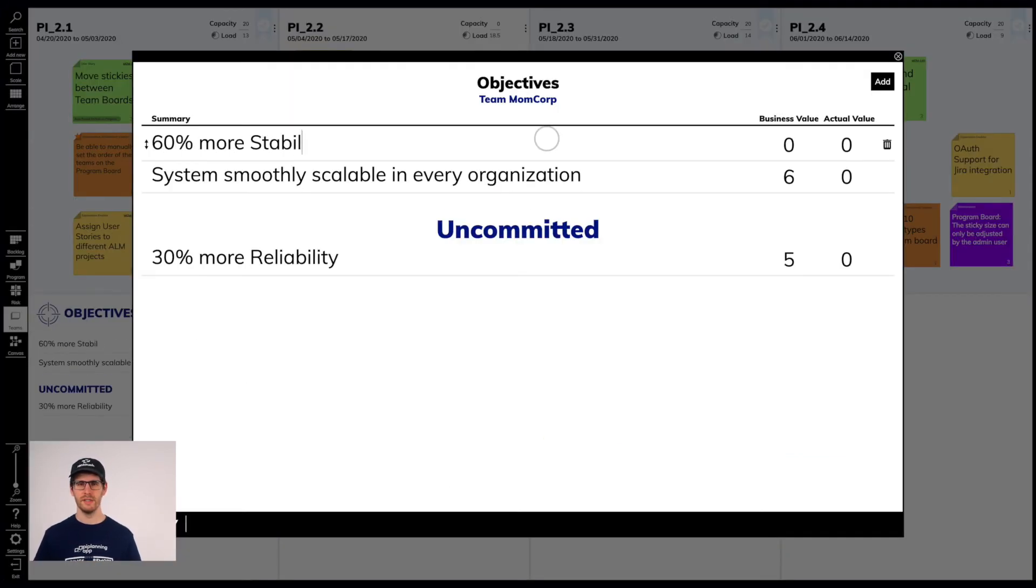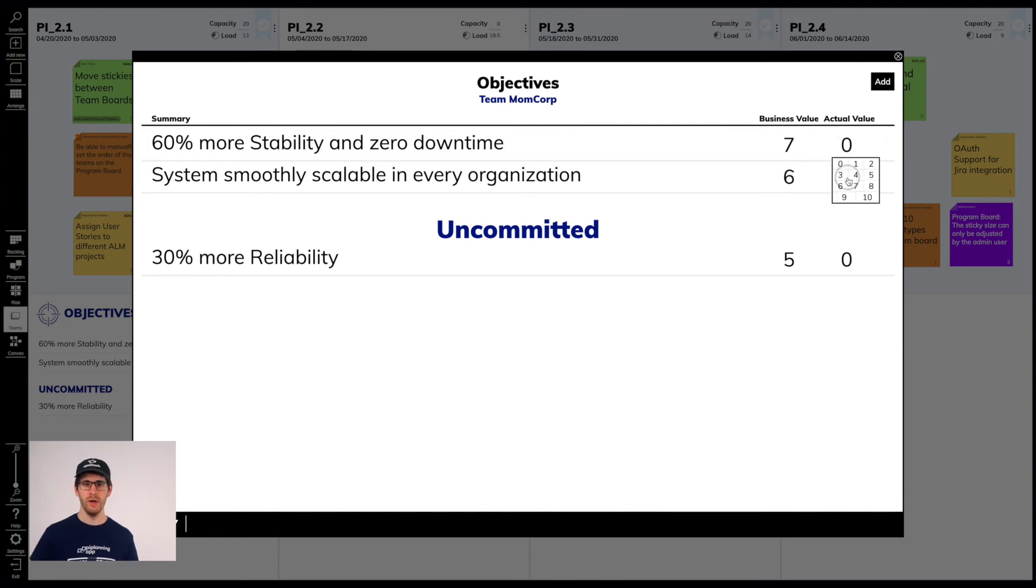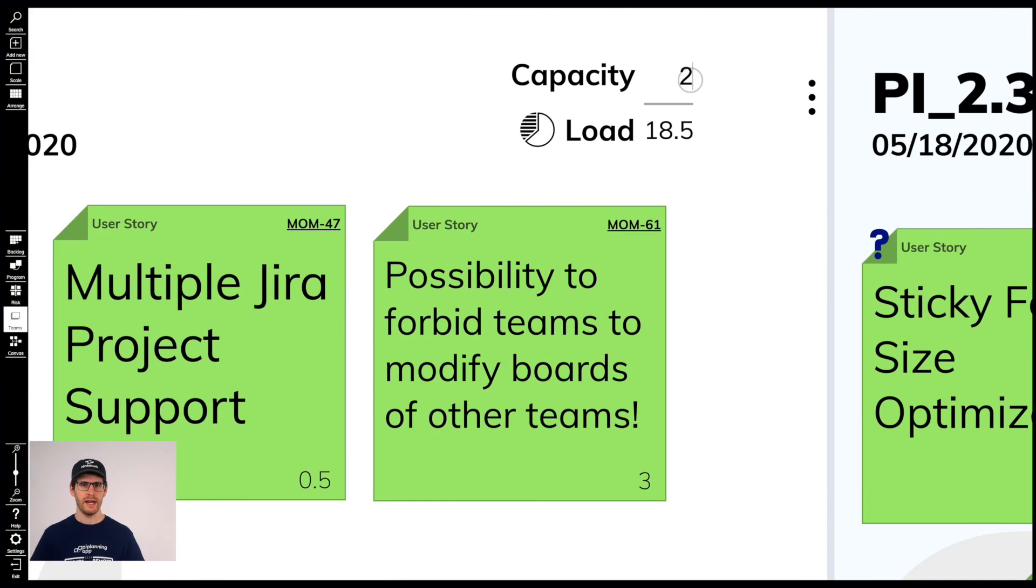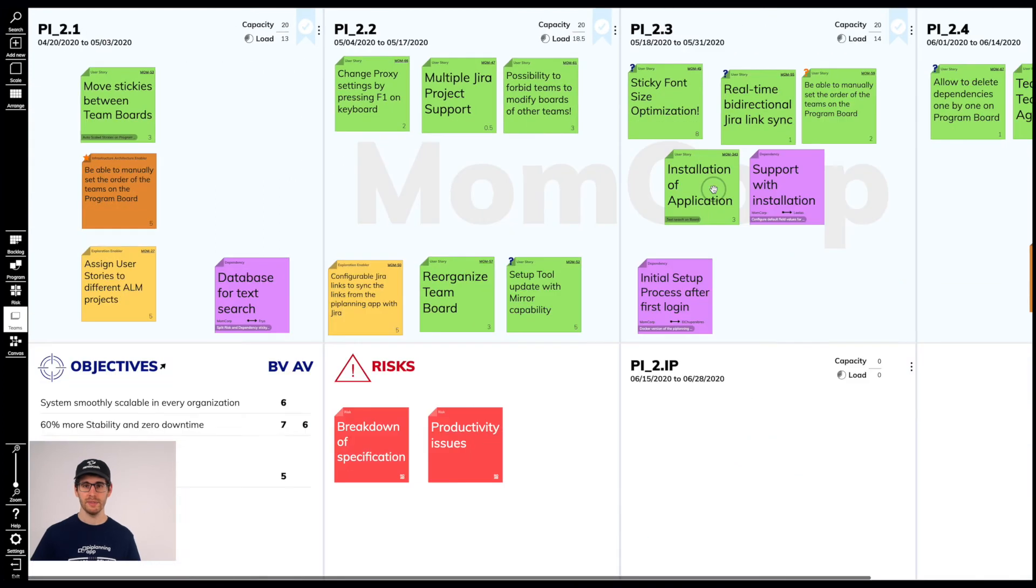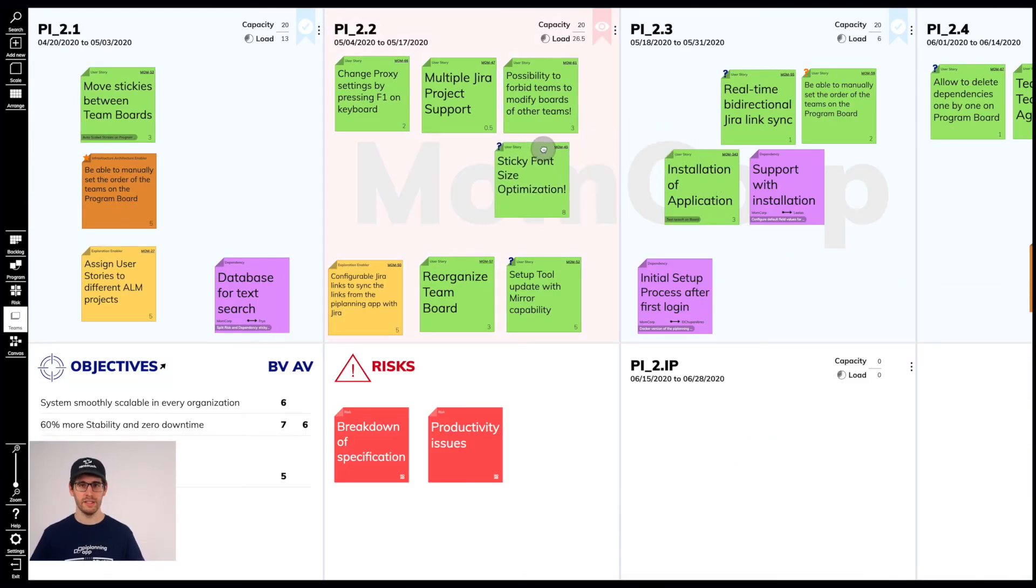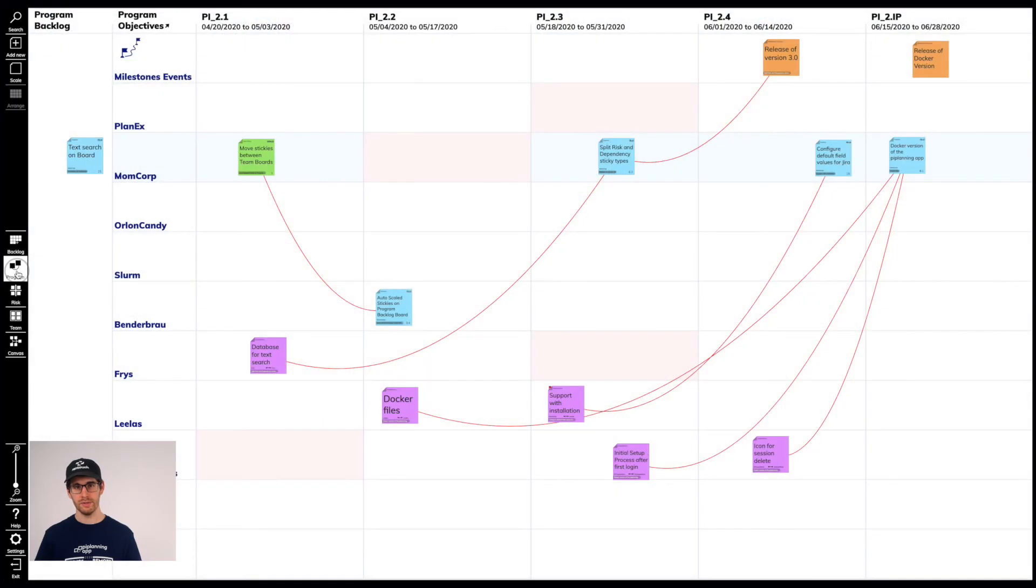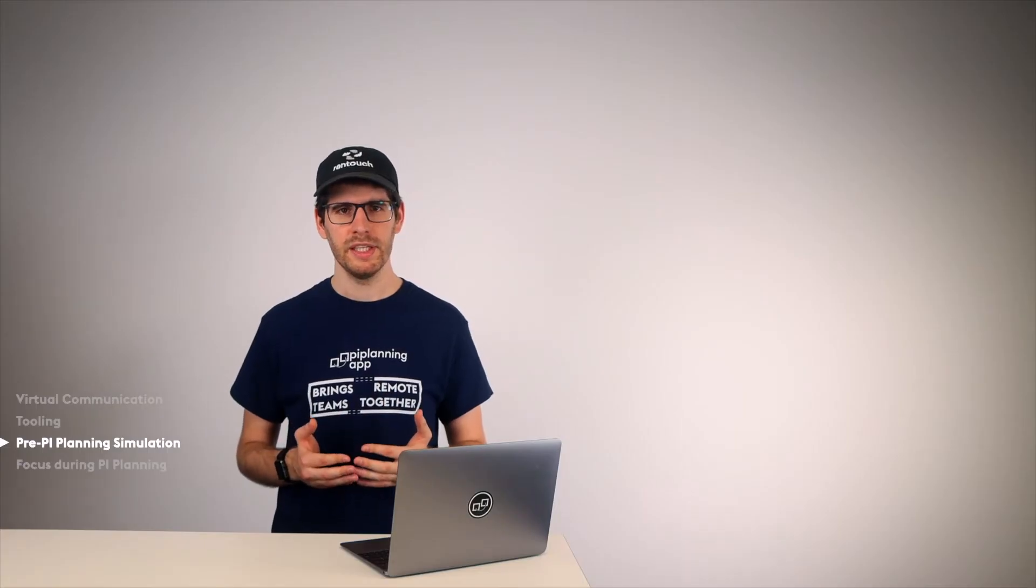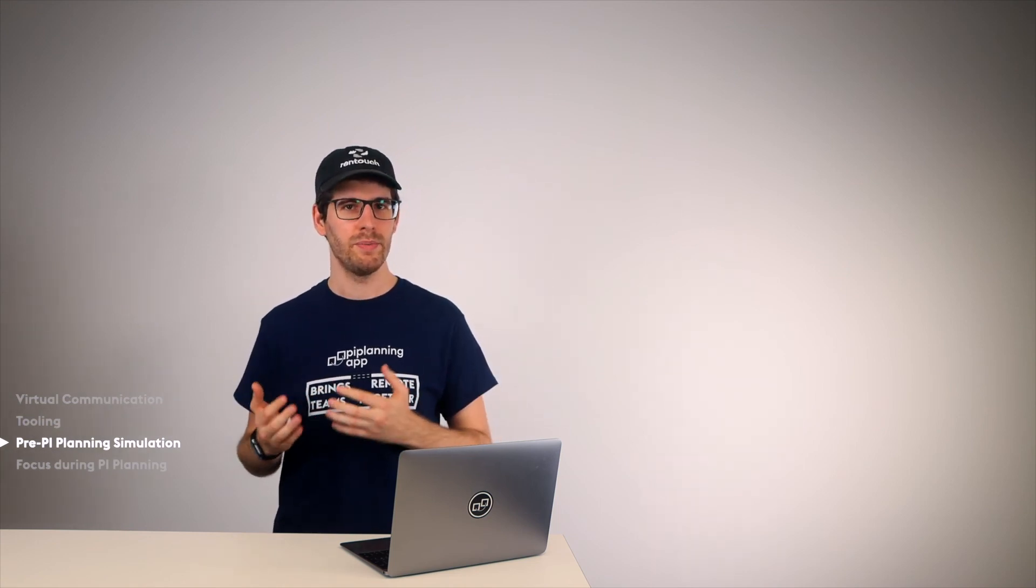Also, how to define objectives. Point out again when to assign business value and who and when to assign actual business value. How to specify the capacity for an iteration. Briefly outline what happens when the capacity is exceeded and where this becomes visible. Namely, on the program board. Also, so the RTE has a good overview of the health of our plan. The simulation gives everyone involved a feeling of being ready. And most importantly, all these basic questions do not become a topic in real PI planning because you don't have time for that.